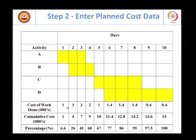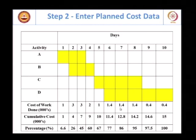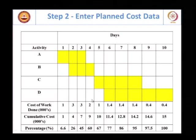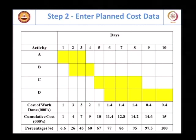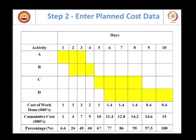I can plot this in the form of a histogram — a bar chart showing how much money I am expecting to spend on each day. I might have to mobilize. Let us say this is a small construction project, and the cost I am talking about might be something like wages for daily labor. I might have to bring this much money to the site each day; it helps me plan the amount of money I have to bring. Very simple example.